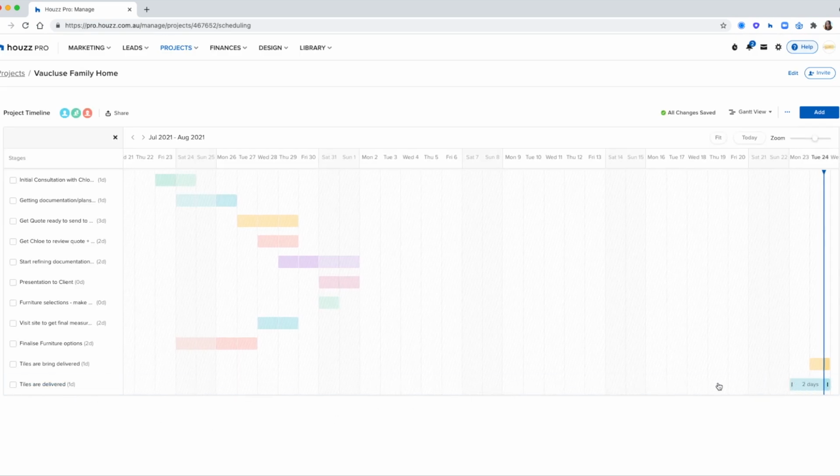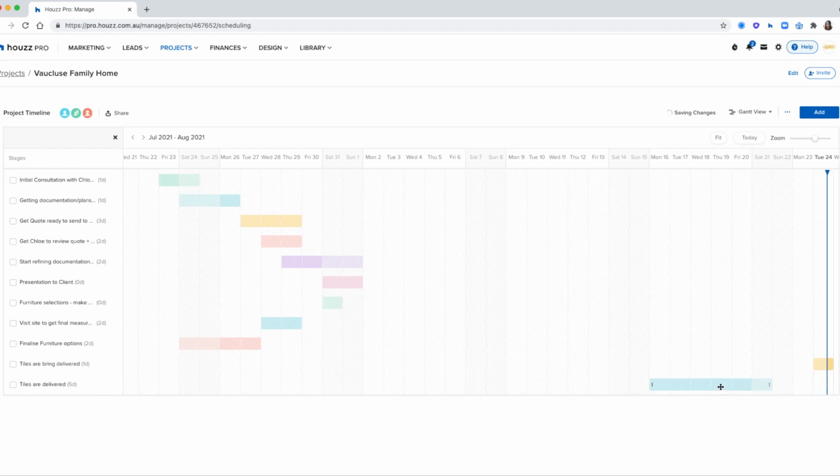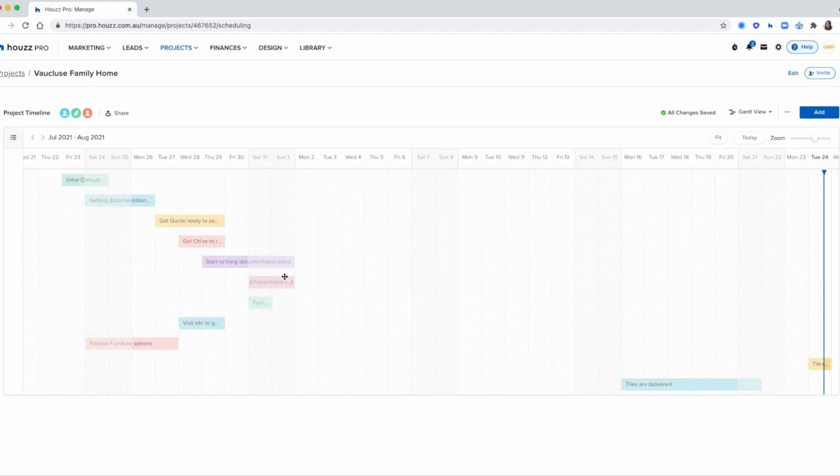You can extend the days or change the days it falls on by clicking and dragging in your interactive Gantt chart line item. For a more focused view, you can collapse each stage name and then it'll present as the actual Gantt chart coloured allotment.